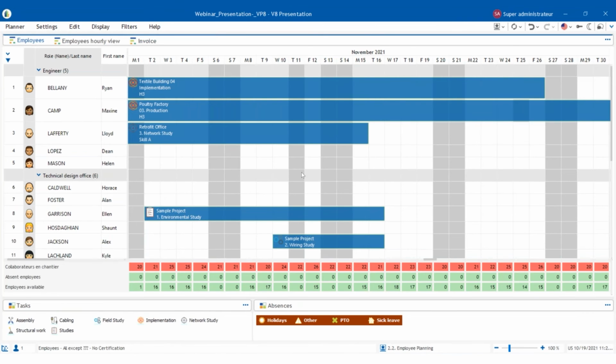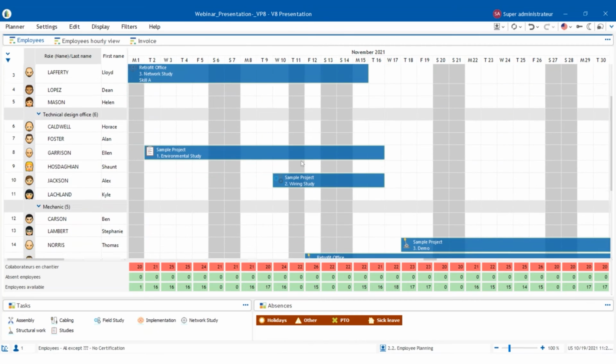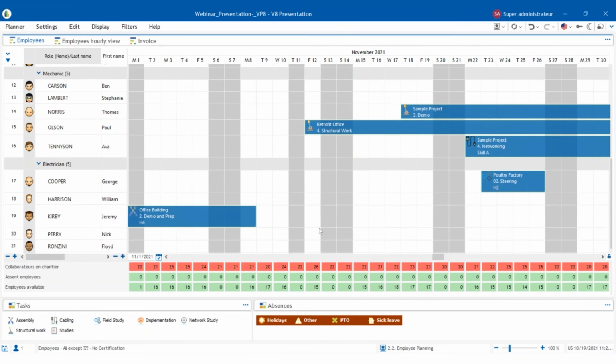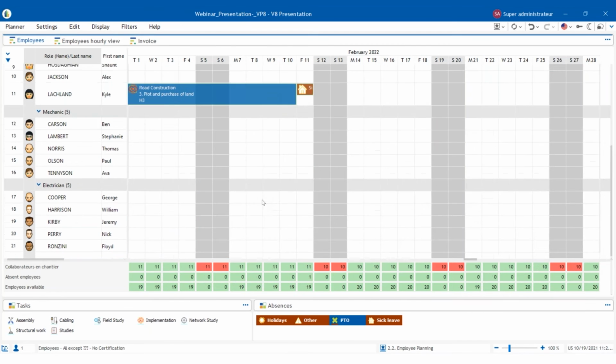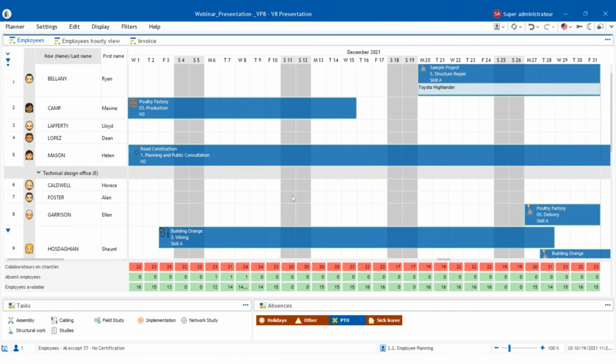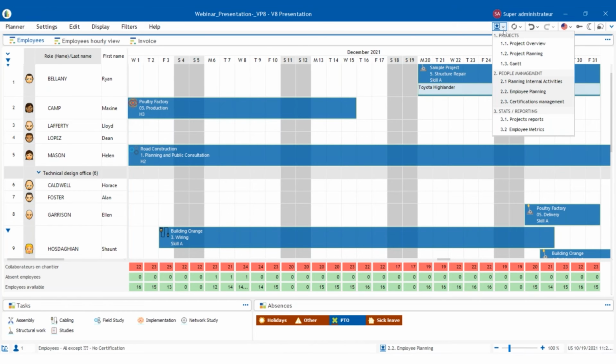Employee, so this is your employees. So this is your resource load. This view is focused on your employees, who's doing what and when. The value of this is, again, showing availability. What it's also showing, though, is opportunity to, number one, assign time off to people if they request it. This is showing you what your resource load looks like, and the value of this is to be able to share with you if you can deliver your project on time. Do you have enough resources? Are you not utilizing your resources efficiently? Again, it enables you to make good decisions for your business about delivery, planning, and just looking at your crews and what looks possible in taking on new jobs and providing new quotes.